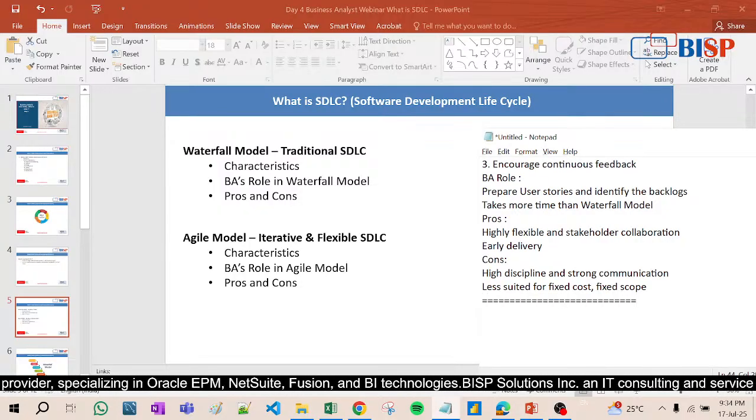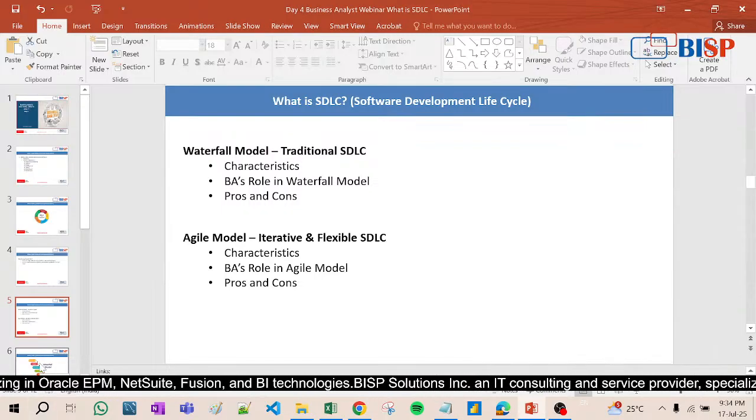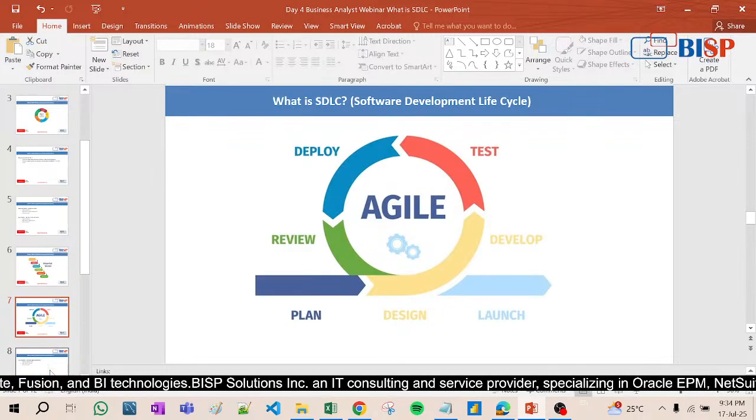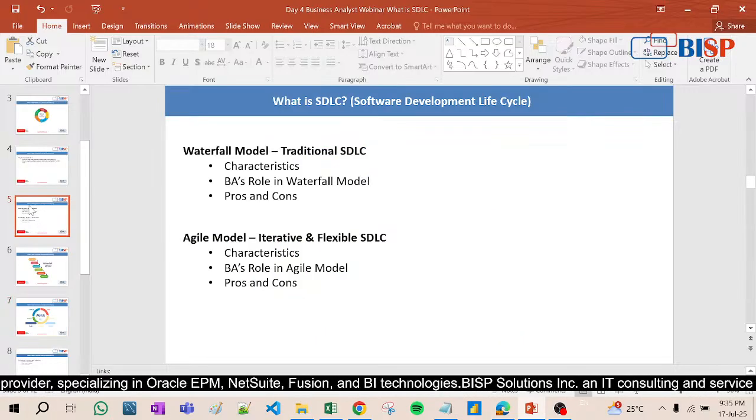So now you are clear with both waterfall and agile. Waterfall means just take the requirement, freeze the requirement, and then hand over the project. Once the requirement is frozen, no further changes. In agile, you give me some requirement, I will develop it and launch it. Again after 6 months I will take the feedback from you: okay, this module needs to be changed. Again we will make some development and relaunch it. So launching, relaunching, and finally you will get the finest product.